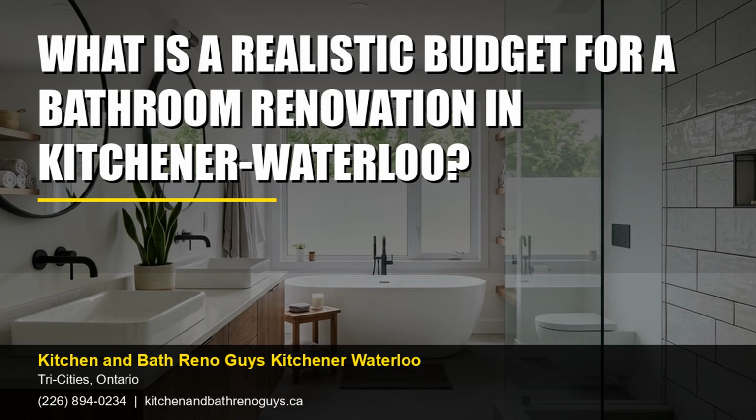It's important to remember that costs can vary significantly based on the size of the bathroom, the complexity of the design, and the specific materials you select. A local contractor can guide you through the decision-making process, helping you balance your budget with your vision. For instance, while high-end materials like natural stone tiles or custom cabinetry can quickly escalate costs, more affordable options such as porcelain tiles or stock cabinets can provide a similar aesthetic at a fraction of the price.